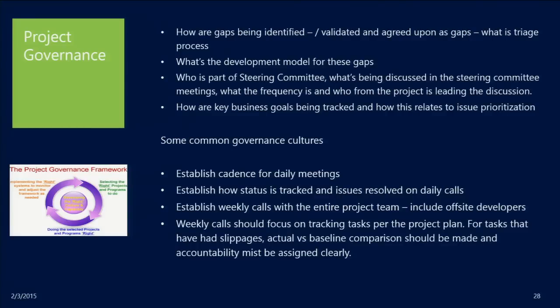Project governance, I'll be quick. He's looking at me. Project governance, an important piece of the overall project, and I like to call this out also within the workshop because some of the things that I see in terms of cultural aspects of project governance just don't exist. And those are, who's part of the steering committee? What are we discussing in the steering committee? How are we bubbling up the project plan and presenting it in a way that outlines these are the key tasks, these are my critical paths, these are my resourcing constraints. See what happens, steering committee, if I don't have this. So my plan should feed into my governance, okay, very, very easily.